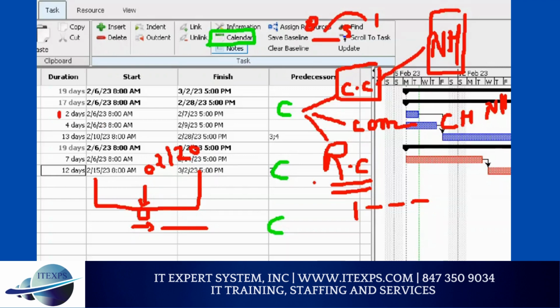But it is possible some company may have 2 shifts. So 1 day means 2 shifts, 8 hours and 8 hours. So you can create a shift mapping, which is the calendar. This is the free version, so we don't have that much ability, but you can map that 1 day equals 8 hours. Some countries in Europe, I heard, and I can be wrong, they don't work 8 hours. They work only 5 hours. So their 1 day means 5 hours.